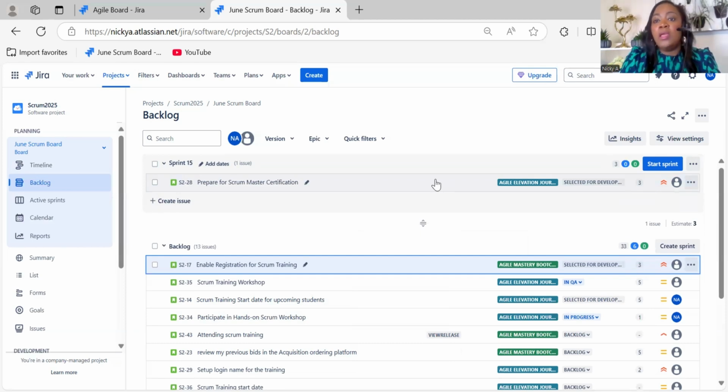Such a small team, right? Again, like I said, in a real work environment, you would probably be delivering more than this. So right now, our velocity is only 2 points. Three is not bad. It's close enough. But again, let's go through it and see if this is going to be okay for the team. So this is the only story that we want to commit to based on our velocity right now, right? I will go ahead, even though it's 1 point over our velocity, but again, I want to hear from the developer if they'll be able to deliver this 3 point story. If not, we can ask the product owner to find something that's smaller, that's still adding a lot of value to the business, that's still a requirement or priority for the sprint, and maybe switch the story, because this one is showing a little bit big.